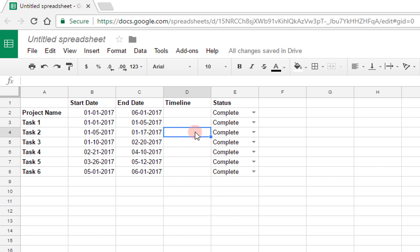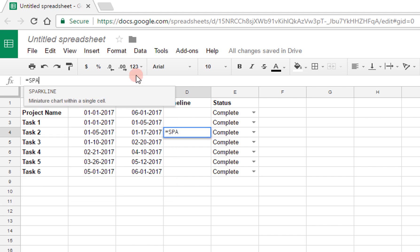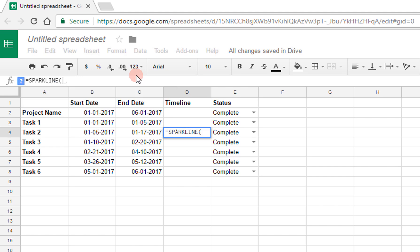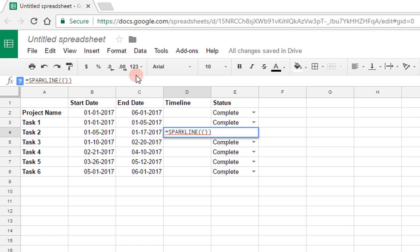So to start it off, I'll select the box that I want, and I'll start to type my formula starting with an equal sign. I'll say Sparkline, and the arguments to Sparkline are going to be first the data, and then the various specifications. So the data will be enclosed in curly braces, and so will the chart specification. The data that I want to represent here is going to be two stacked bars. The first one is going to go to the start date of the task, and the second is going to go from the start date to the complete date.